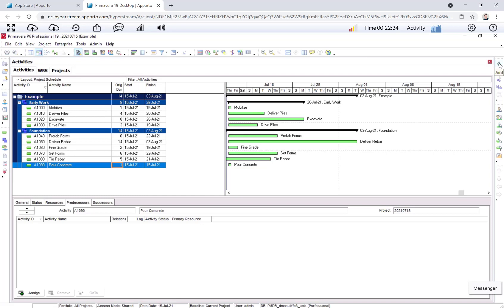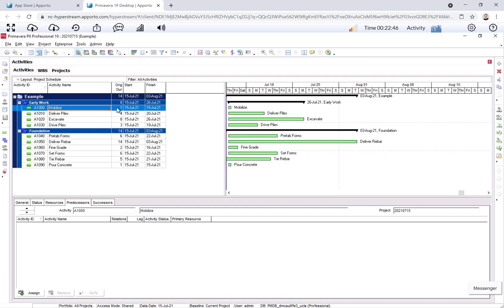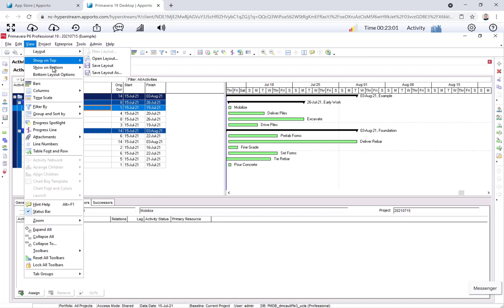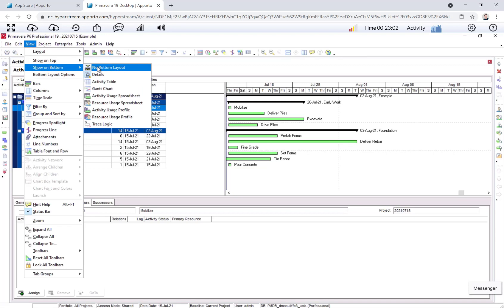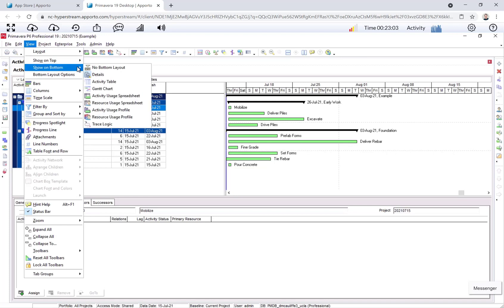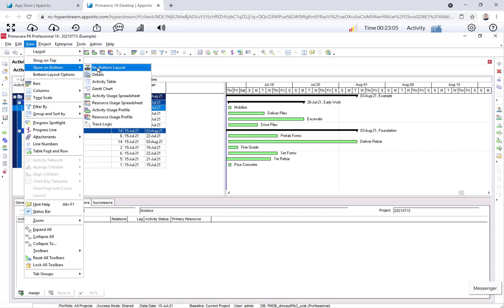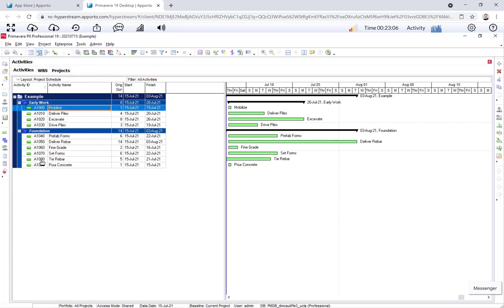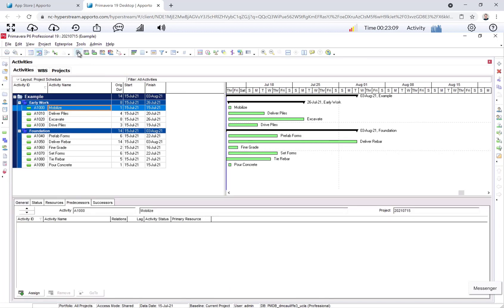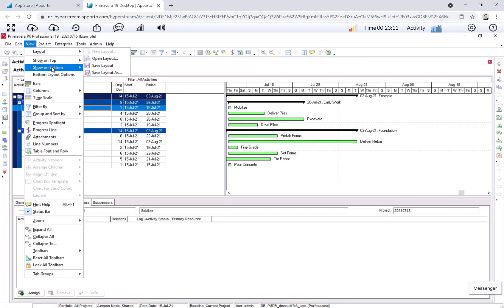We now need to assign the logic so that we can finish the schedule. And assigning logic is essentially drawing the arrows in a network diagram. So we select one activity. Let's look at Mobilize, the first one. And notice down here in the Activity Details tab, and if this is missing, you can get it by clicking right here. Or say view, show on bottom, details.